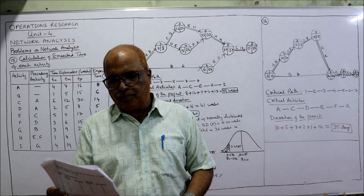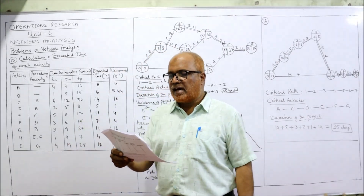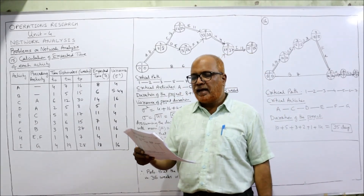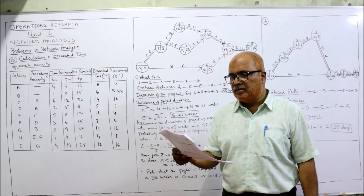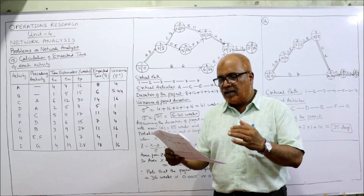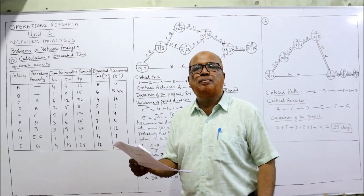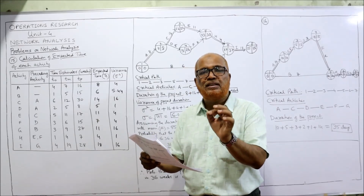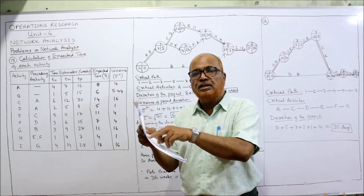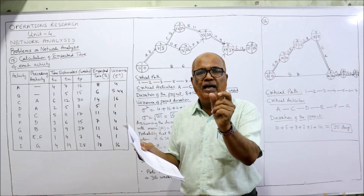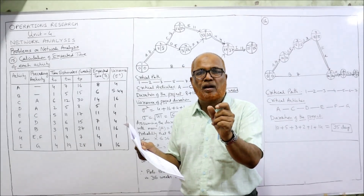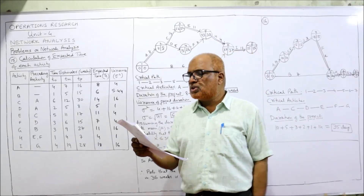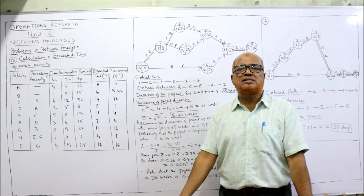Now see the 15th problem. A project has the following activities and characteristics: activities A, B, C, D up to I. There is no preceding activity for A and B. Then we have A, A, C, D, B, H as predecessors for the other activities. There is a misprint for activity I — the predecessor was only G written in your question paper. Along with G, write down H, so G and H is the predecessor for activity I.